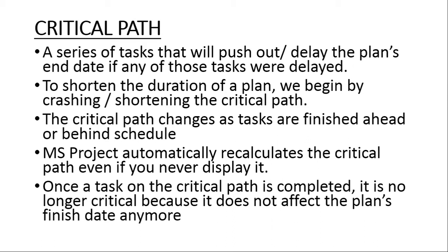So the critical path is always starting from the point where we are to the end of the project. When we start the project, the critical path will start right from the first task to the last one. But when we are in the middle of the project, the critical path starts there at the middle of the project where we are to the end of the project.